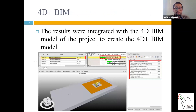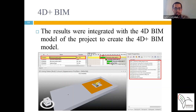The results from the previous step were integrated with the 4D BIM model to create the 4D+ BIM model. This figure shows a view of the resulting 4D+ model of the project. As you can see, an excavator was used as a resource for the activity marked with a red rectangle in the project plan to dig the middle parts. This resource increased the presence of hazardous attributes in this activity, and several hazardous features were identified. Therefore, it is necessary to consider appropriate strategies in project planning for its safer implementation.